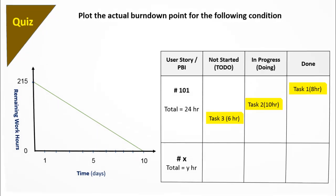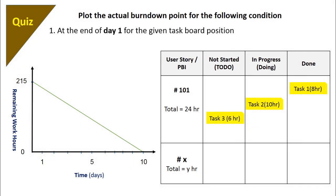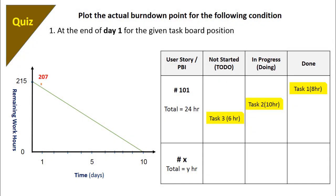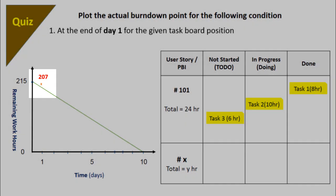On every working day, at the end of the day, the scrum master would check the visual story board then update the burndown chart based on the remaining work. Plot the actual burndown point at the end of day one for the given task board position. Task one worth eight hours is completed, hence we need to plot the remaining work which is 207 hours.